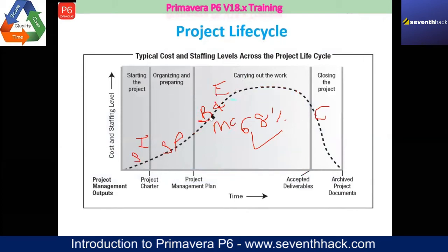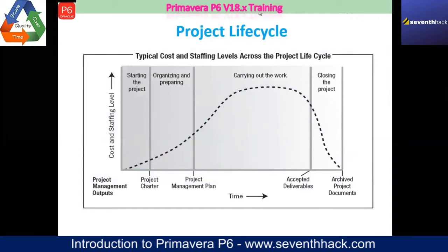So if you are doing something, do it with full knowledge and full scope, and make sure whatever is varying does not vary more than 5%, which is called the acceptable variance. If the variance is more than 5%, you would find it very difficult to manage, and very difficult to keep the project profitable, and that doesn't make any sense.